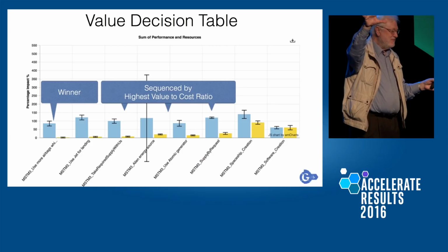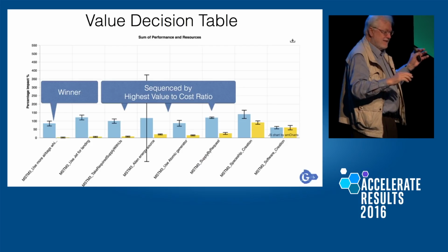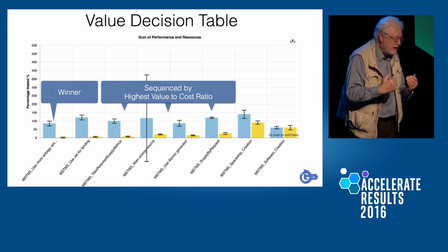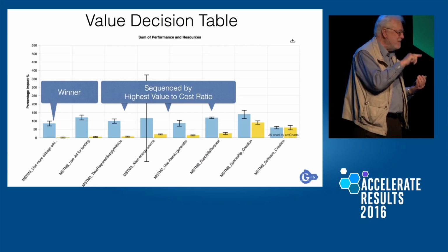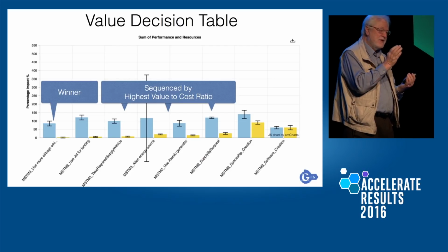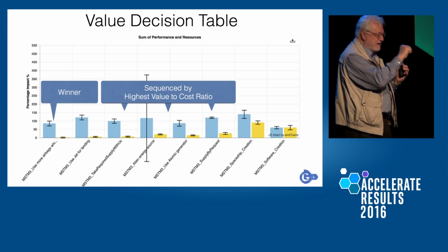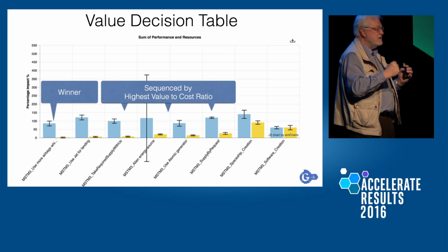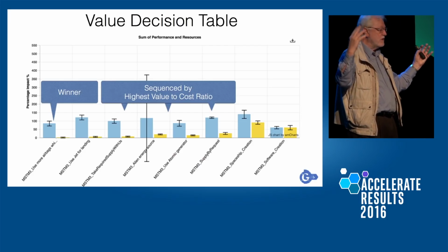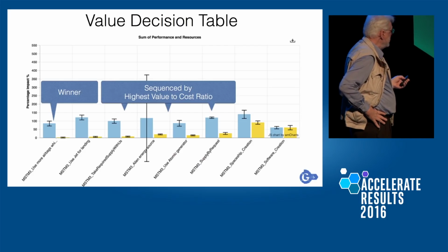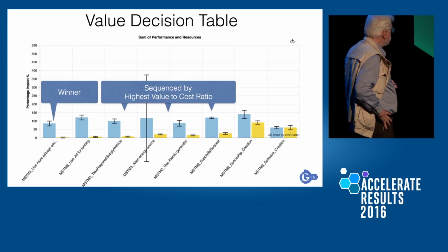Okay? There's a third stage, which is how good were they in that first week, we measure and plug in the learning. This is a plan, do, study, act cycle of Deming, for example, happening. We can do, capture the detail, study, and then act, like change the design, change the cost framework, time framework, whatever is necessary to meet your overall objectives within a reasonable time frame.